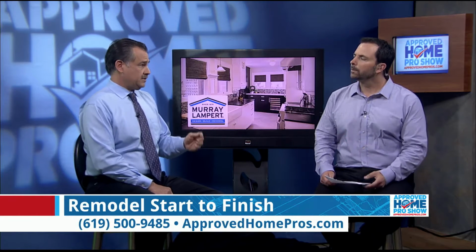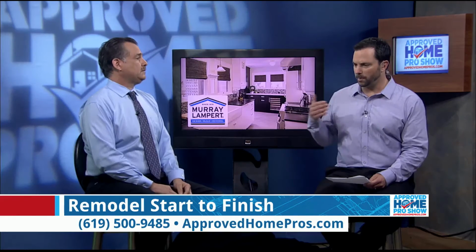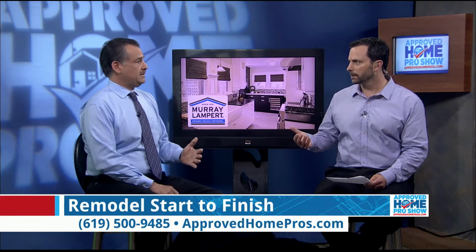So in a contract, there should be the working days, how long it's going to take. There should be, if there's going to be a down payment, it can't be more than $1,000 or 10%. Whichever is less. And the progress payment schedule with milestone payments so that you make sure that each phase is completed before you make that payment. Your deposit is due typically at contract signing, but not always. Some companies don't take a down payment, so you might just ask questions about that.